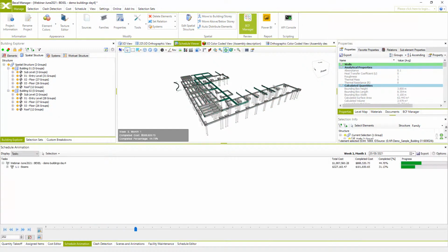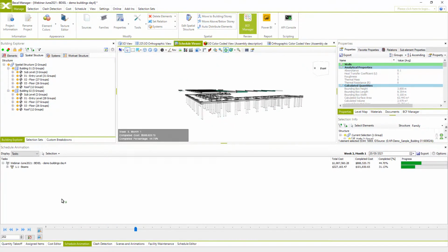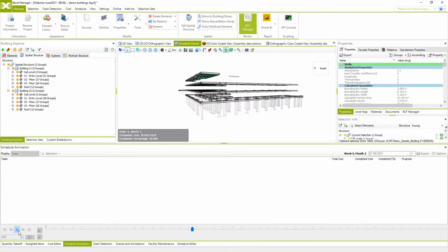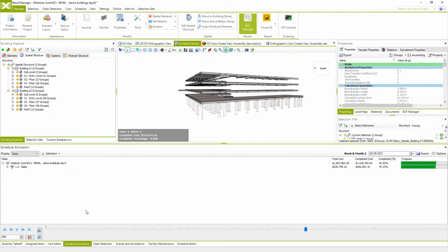In this simulation we can see the structural works are being executed exactly as we set relations in the methodology editor. Execute foundations, then beams, then slabs, and then walls and columns. And that's not exactly what we wanted. We want these relations to be transferred through all levels.